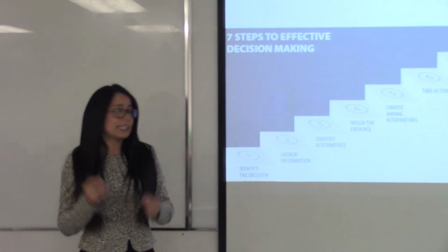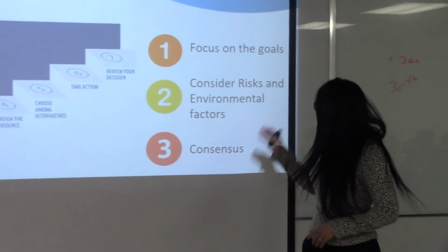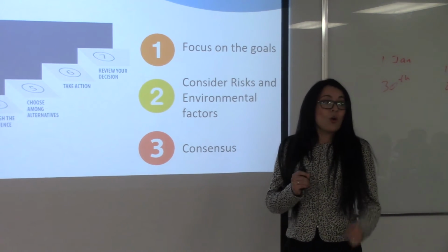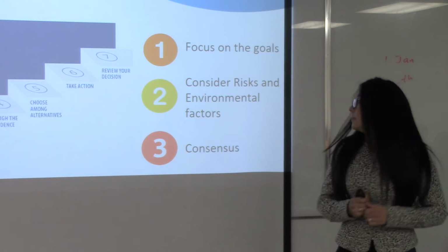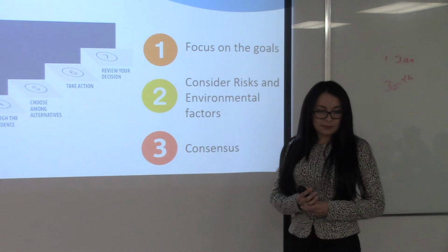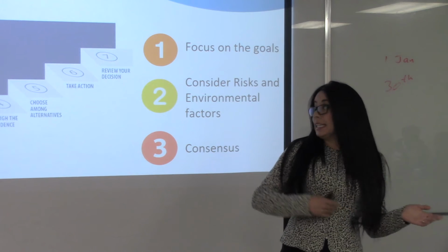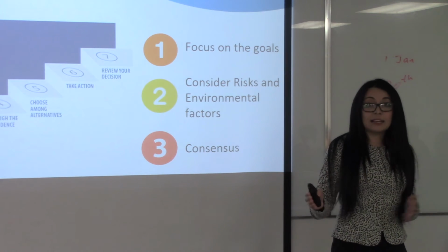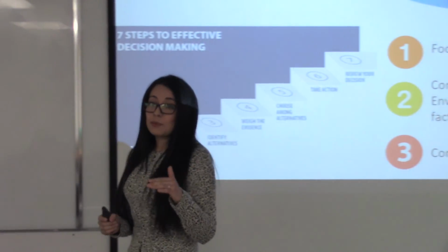However, generally speaking, we focus on the goals all the time, and we consider risk and environmental factors. By risk, we mean, what if other teams are bidding higher on the resources that we wanted? And by environmental factors, I don't know if you guys realize that, for example, the rough carpenter increased their average rate in different rounds. They were cheaper in round number 4, and then in round number 8, if you wanted to bid on a rough carpenter, the standard rates were higher.